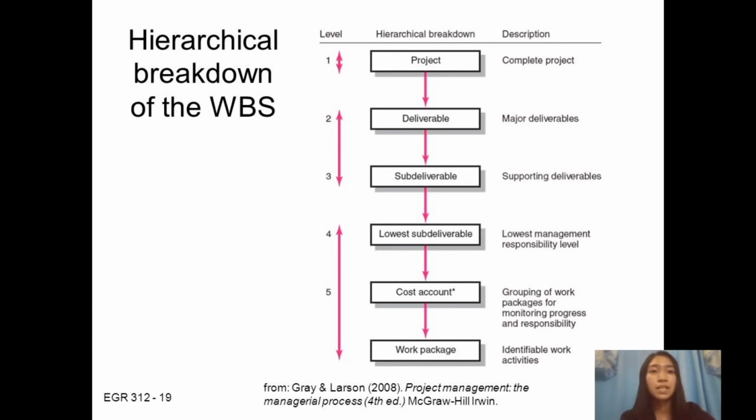And then at the lowest level of the hierarchy is the work package. It is the basic unit used for planning, scheduling, and controlling the project. In a work package, there are teams involved, for example, the carpenters, roofers, architects, and painters. As an owner of the building or as a manager, you can break it down into smaller tasks, like you will be assigned here, paint the wall by tomorrow, or finish the kitchen in a month. So those are your work packages. It is an overall manager.